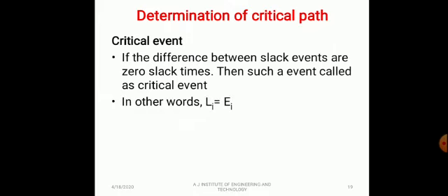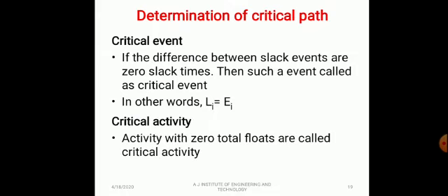In other words, latest finishing time and earliest starting time are both equal. Critical activity: activities with 0 total float are called critical activities. Already I told you.